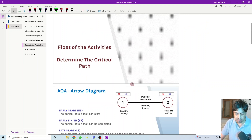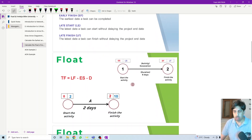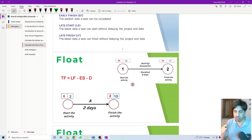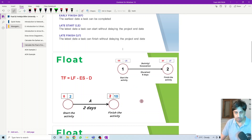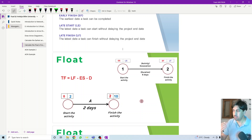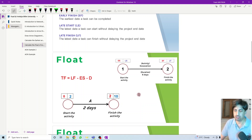The second target is to determine the critical activities and the critical path. Before we determine the critical activities, we need first to calculate what we call the float. A float tells you the flexibility of the activity — the number of days an activity can be delayed or extended without affecting the total project duration.